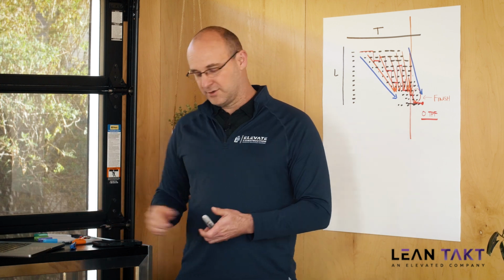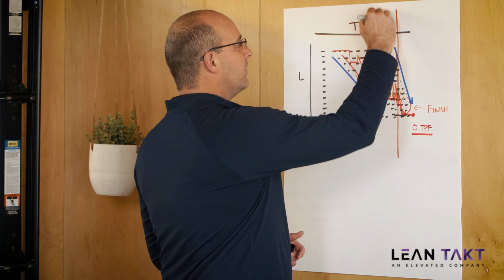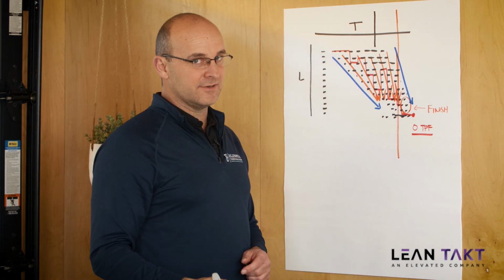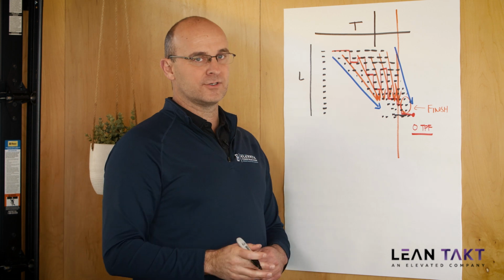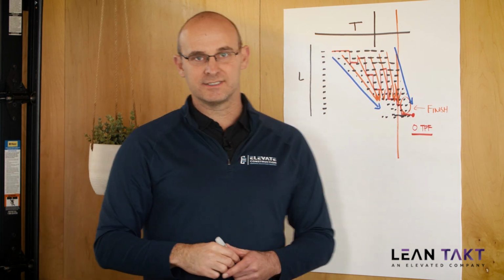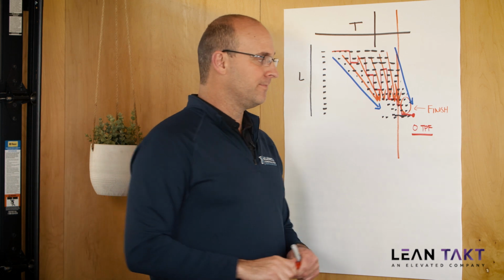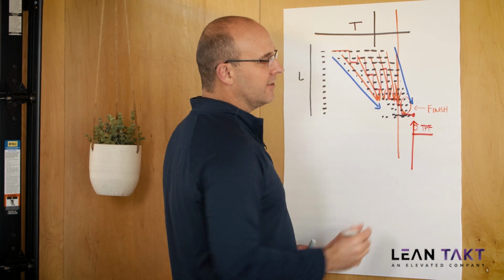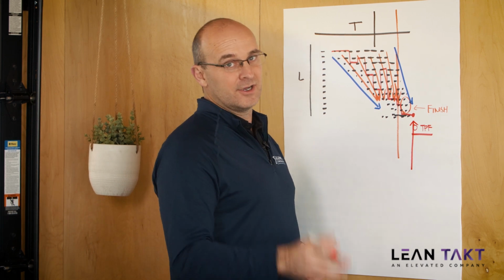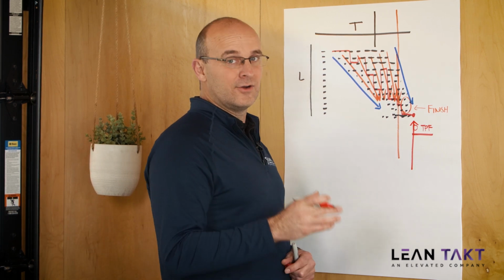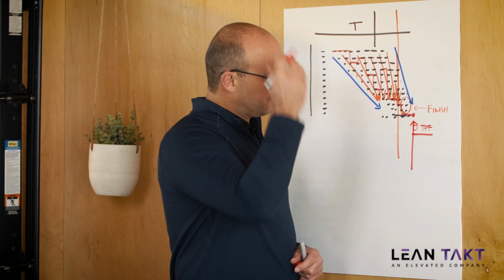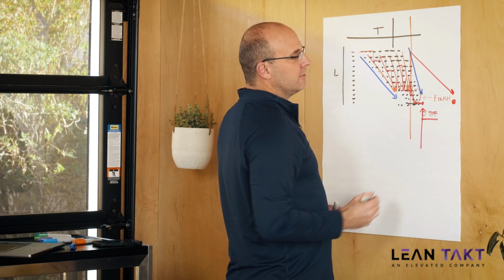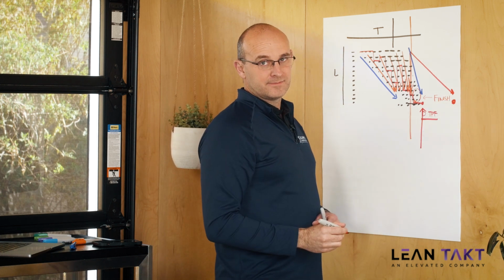Now, 2/3 of the way through, like I said, they started to have a problem, and that's because you started to see the stacking. And now you have the bungee effect, which is when you stack or burden trades, it's going to extend the duration instead of shorten it, okay? So here's the rub. They were never going to finish here, even though the computer said they were on schedule and had 0 days total project float. They were going to finish here. So the schedule was lying to them.